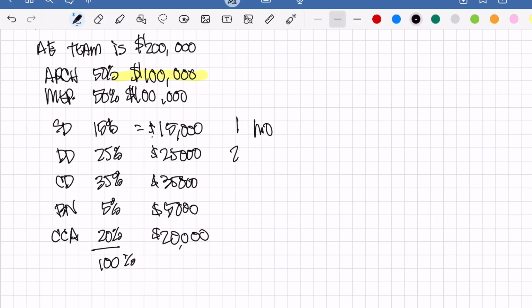Design development, let's say, is 2 months. Let's say that contract documents are 4 months. Let's say the bidding negotiation, which is usually 2 months, and we can talk about calendar days versus working days, but I'll just say for the sake of argument, it's 1 month. And construction contract administration. Now again, this type of project, let's just go magically at 10 months. I don't think it would, but you never know. So the whole thing, do the math, 3, 7, 9 is 19 months.